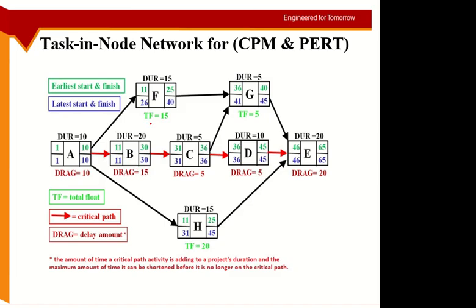that means after I move forward from A, either activity F or activity H will give me the longest duration. B cannot give me the longest duration with 14 days of work because the other two activities are already longer. So this is the concept of drag, and this gives you one of the crash limits. You need to keep the activity on the critical path.